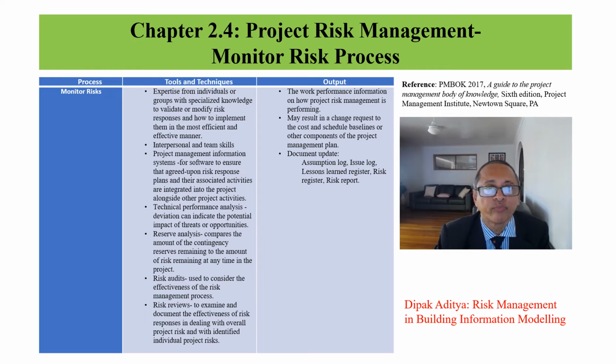Monitor risk. It is performed throughout the project. To monitor risk, it needs expert knowledge of validating or modifying risk responses. Risk review can also help. The risk monitoring may result in a change request for the cost and schedule. The change request has to go through the formal change control procedure.